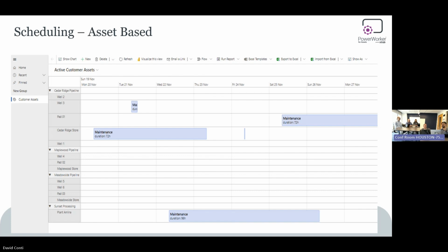So this visual is trying to give you the ability to plan that maintenance and move it around, to say, well, these are reactive tasks, these are little preventive maintenance tasks. Let's get the right plan here for our outage to achieve that production throughput. And especially down the bottom, where I see the plant has maintenance, that's a great time to go and maintain everything else, because you know you've got no throughput happening.